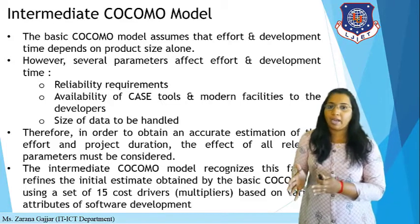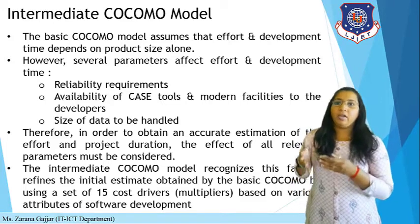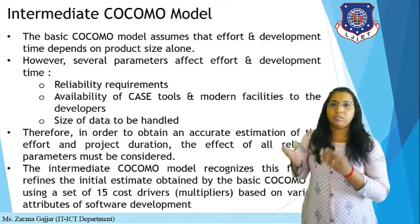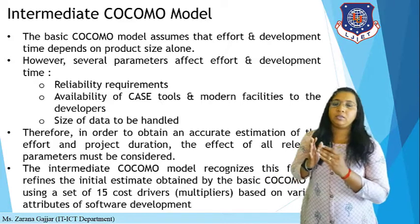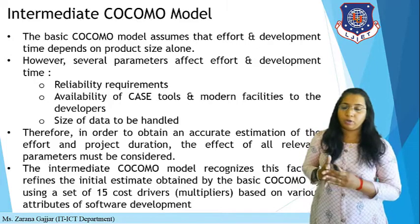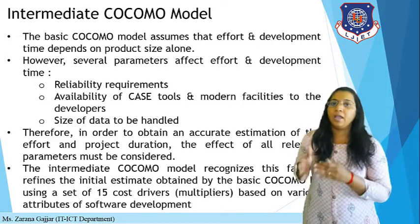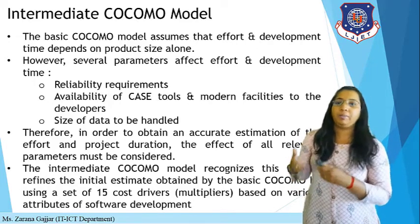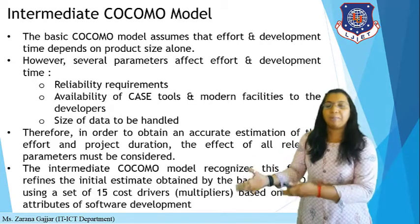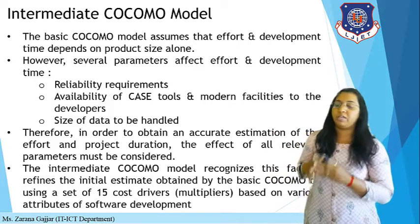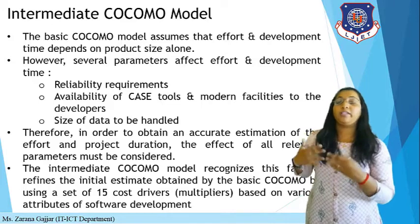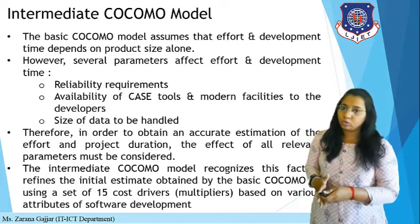The intermediate COCOMO model recognizes this fact and refines the initial estimate. It refines the requirements obtained by basic COCOMO using a set of 15 cost drivers — multipliers based on various attributes of software development. It also uses the basic COCOMO model for cost estimation, but uses 15 different parameters to calculate the actual cost of your software product.